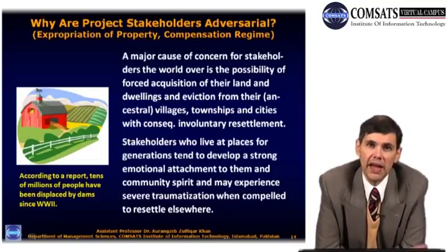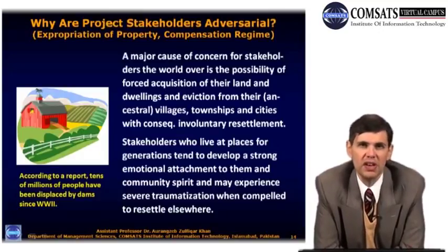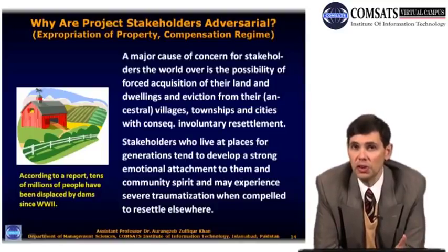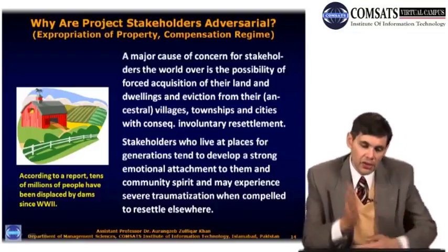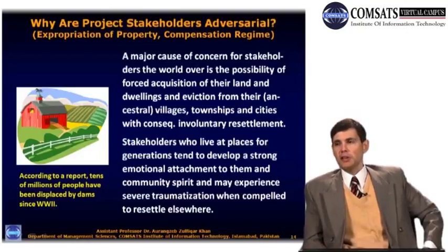So it's not only the economic or financial cost of moving somewhere, but also the psychological cost, the traumatization, when you feel you have been taken away from something very precious, very dear to you, and sent somewhere else where you may not want to go at all. That is also a cost which normally is not considered in the costs of such projects when talking about resettlement of people. Then of course there are all kinds of issues associated with compensation and resettlement. Many dams which were built even decades ago, certain people have not been paid their compensation yet. And those who are involuntarily resettled often feel that the compensation given to them is not sufficient. It does not reflect the losses they have incurred as a result of the project going ahead.